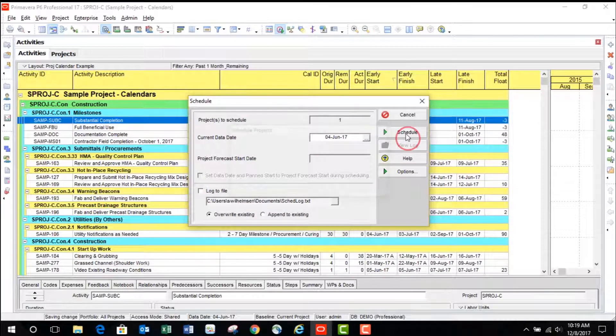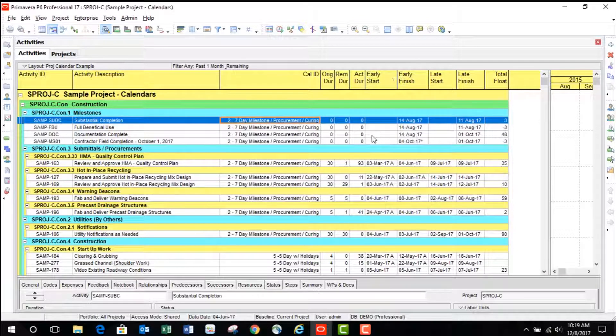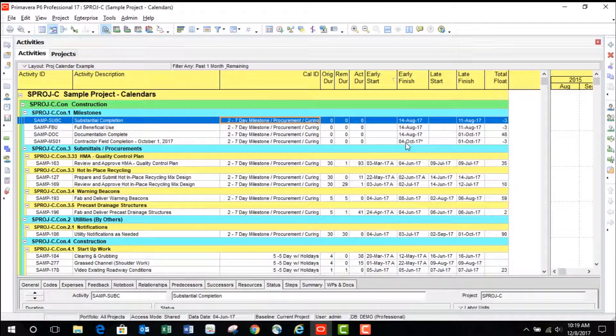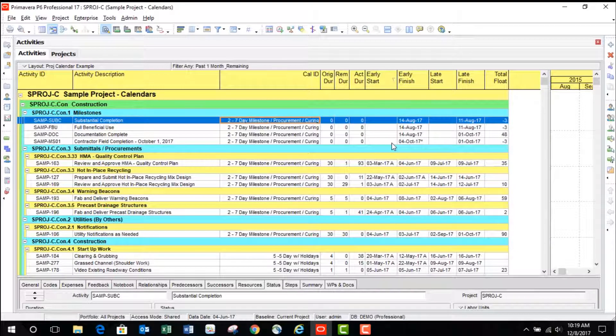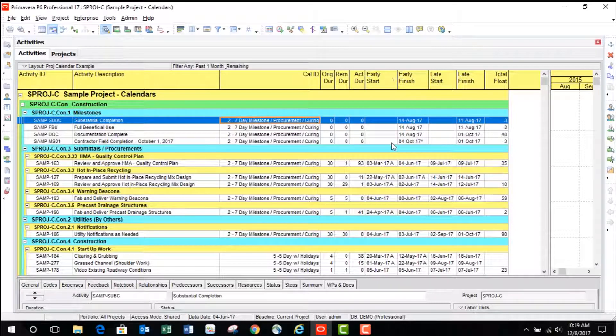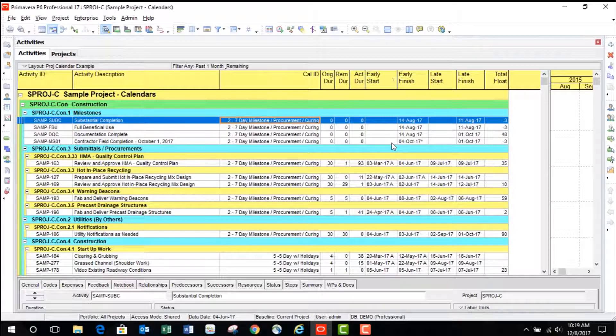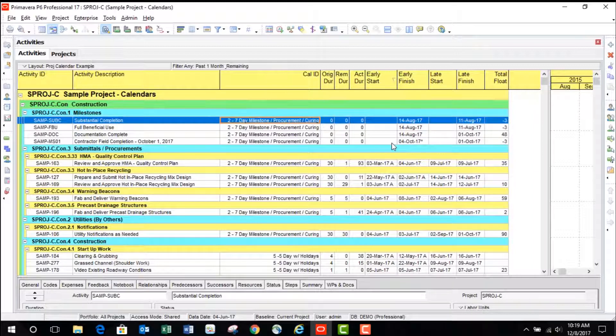And again we'll start off with calculating. And now you can see that from the same schedule file we're seeing the project finishing three days late on October 4th. This can cause a lot of confusion and can be frustrating while you try and track down the reason for the difference.